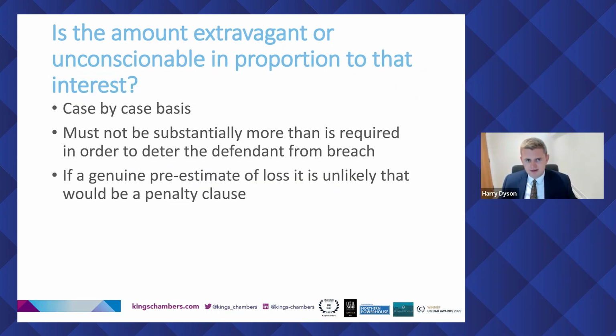On to the final limb, which is the one that often people want to jump straight to: is the amount extravagant or unconscionable in proportion to that interest? Again, this is decided on a case by case basis, and that is why it really is difficult to advise on. It must not, as a general rule of thumb, be substantially more than is required in order to